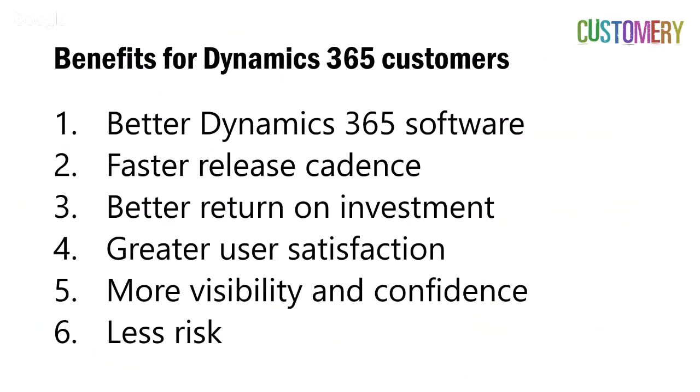If you can get users using the software in a couple of months, and there's some value in doing that, then you don't have to delay that value realization for a year or more that you might have with another approach. Scrum projects have a higher return on investment, partly because of that benefits realization happening earlier, but I also find that they cost quite a bit less, maybe 30 to 40% less than projects following a traditional methodology.